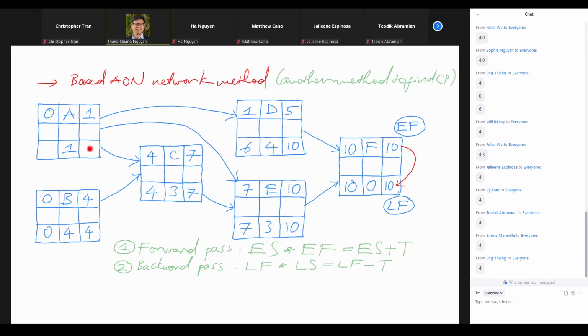So that's why we have to choose the smallest, right? Earlier we choose the largest when we go forward, but when we go backward, actually we have to choose the smallest value among the candidates, or the earliest dates among all of the candidates, right? So that's why it is 4. If you write out here 3, okay? If you write out here 3, then we will not have any time conflict.